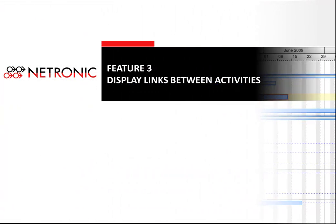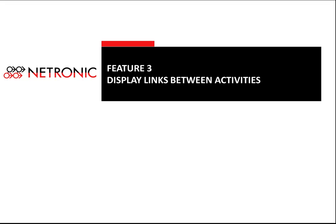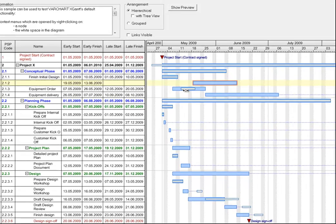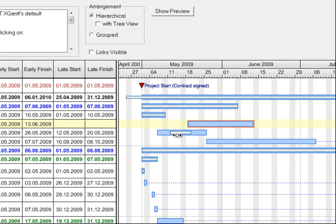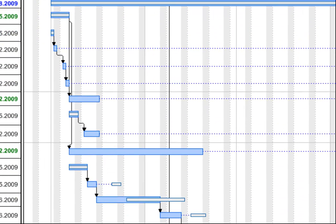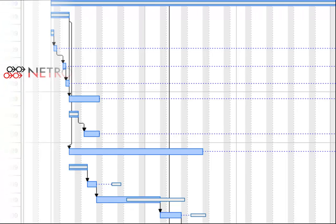A critical aspect of time-centric planning, like you typically do with a Gantt chart, is to understand the dependencies between activities. However, if you have many activities, showing all links between them might cause more confusion than insight. A flexible Gantt tool allows you to show and hide all links with one click and also supports various link types like end-start, end-end, and others.